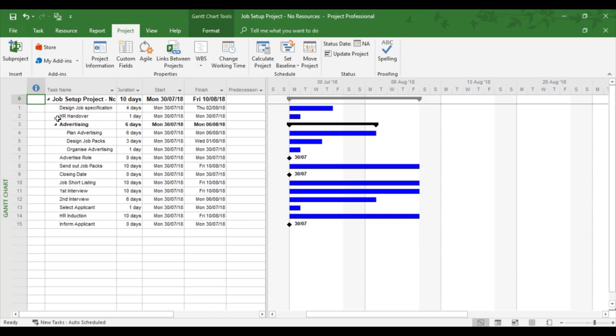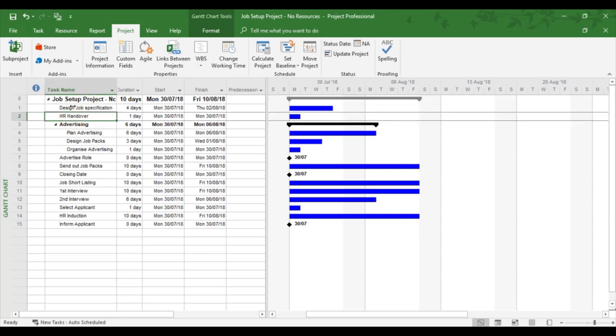So for example, if Microsoft is linking task 1 and task 2 together, it would look at task 2, then look at the predecessor, which happens to be task 1 and link them together. So task 1 finishes, then task 2, the blue bar starts.